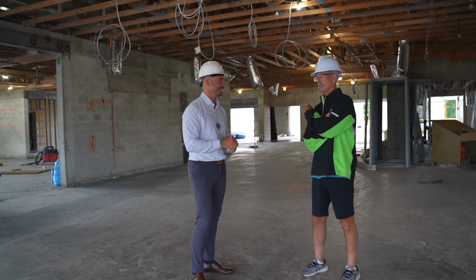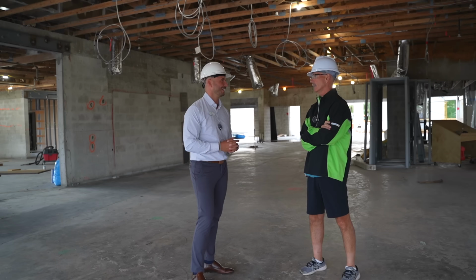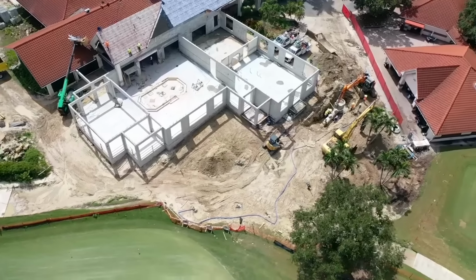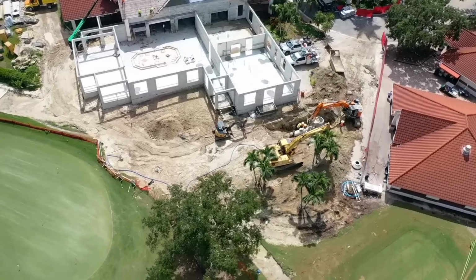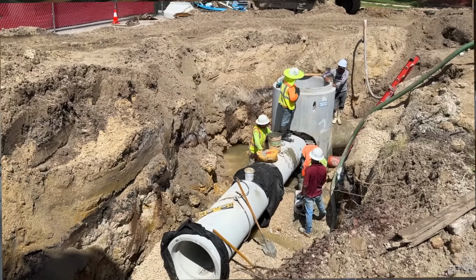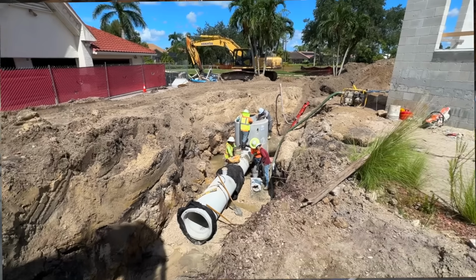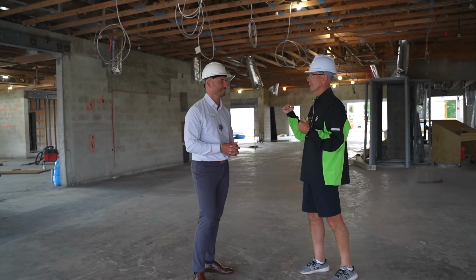So at the north and west end of the building, we have site construction in progress for the last 2 weeks or so. They've dug a trench probably 12 feet deep, 20 feet wide, 100 foot long. And there's drainage structures, 2 foot diameter concrete pipe that picks up all the water off the roofs of the building. It actually gets all the water at the south end as well, which pipes around the back of the building, past the practice areas. So all this rain that we get in large volumes over long periods of time, it all flows into the lake by number one hole.